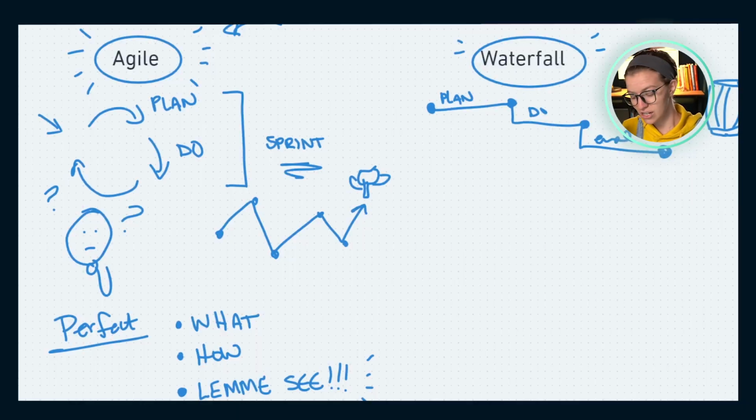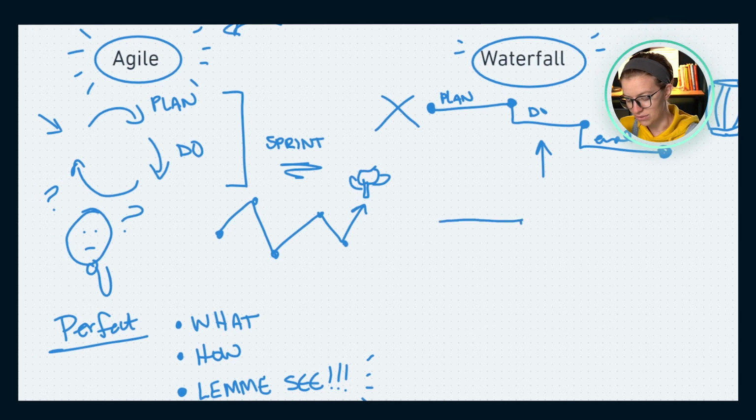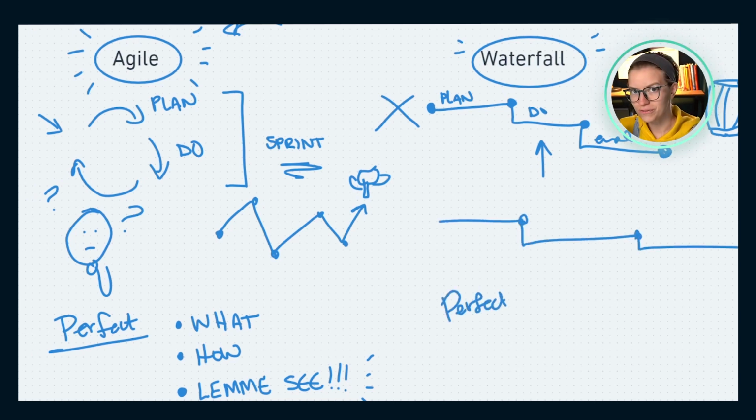If plans change in Waterfall, if we find out while doing, oh no, we forgot to plan for this task, we forgot to include this person, oops, we can sometimes make small modifications to the scope. But if we find that there's a drastic change in how the project is organized, we need to basically kill our entire plan and build a new one to incorporate that new endeavor.